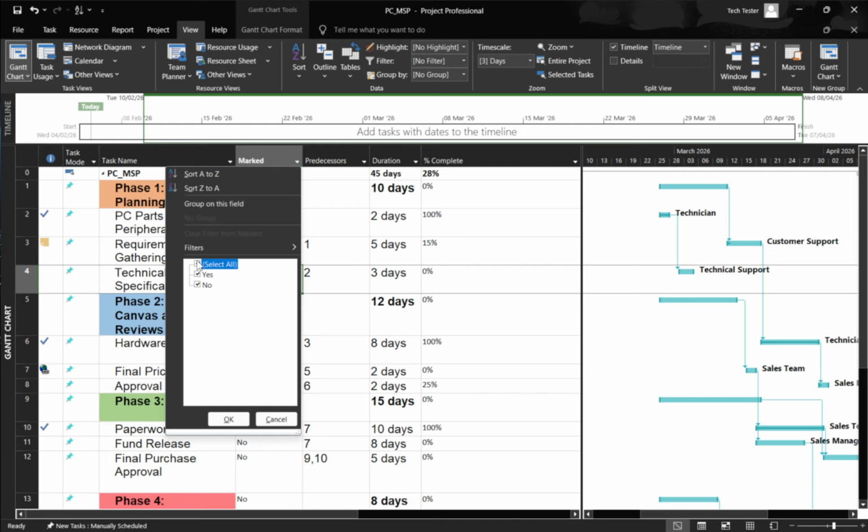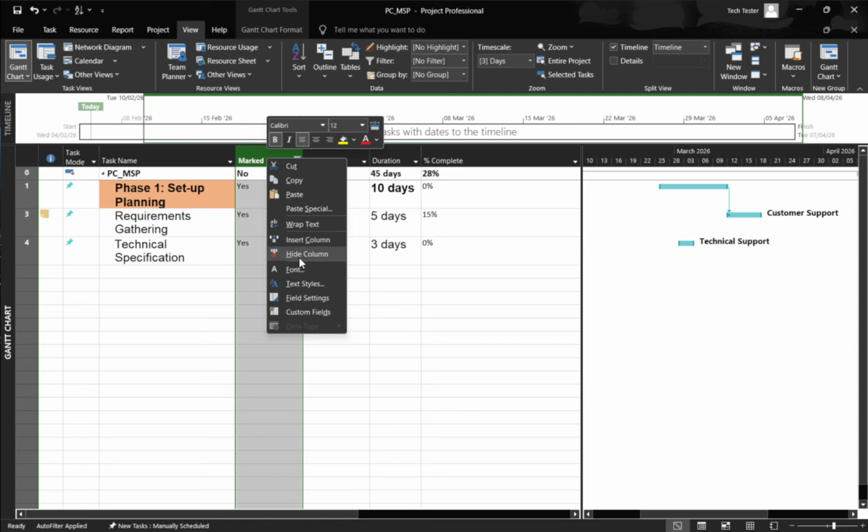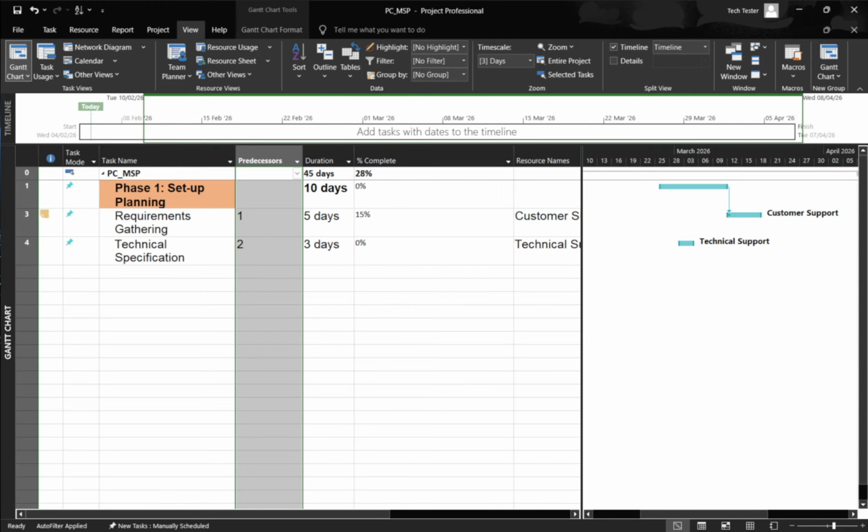Lastly, if your goal is to simplify the display rather than hide individual items, collapse subtasks. Use the outline controls on the View tab to collapse summary tasks so the subtasks roll up and disappear from view. You can also use Project, then Outline, and choose Hide Subtasks to show just higher-level summaries. Remember, nothing is removed. You're simply collapsing the structure. Expand when you need the details again.